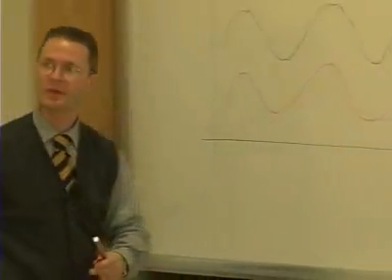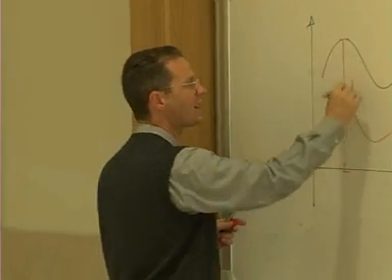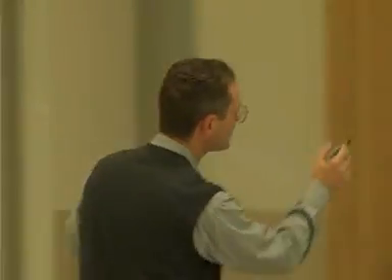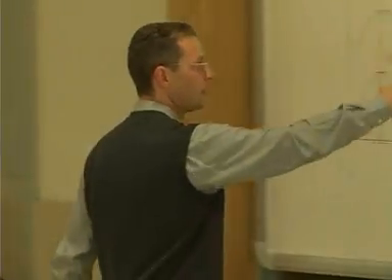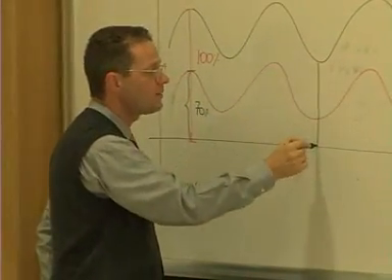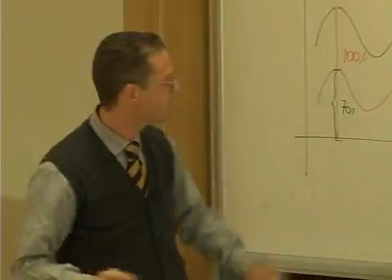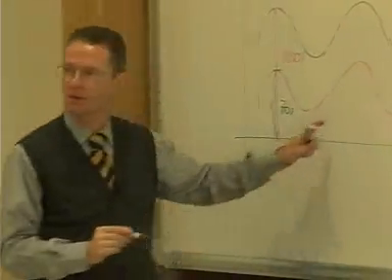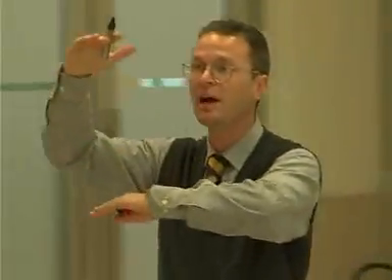If it is this way, I know that, this being the 100% amount of money available, I can stipulate with banks that an amount of 70% is dedicated every year to the payment of capital and interest. And so, if in this year, a weak year, a poor year of performance, the amount of cash available is 100%, you can easily see from the graph that the amount of money dedicated to the repayment of capital and interest will be again 70%. But in absolute value, this amount will be much lower.